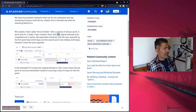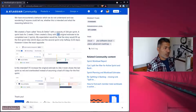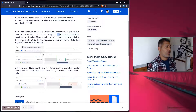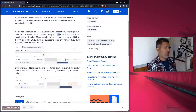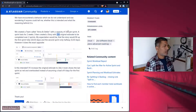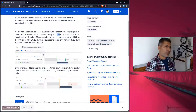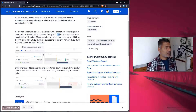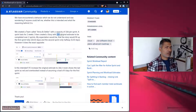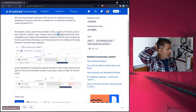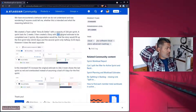So instead of creating one story with a 15-day estimate when you have a team with a capacity of 10 days per sprint, I think it is better to just break it up further, or maybe increase your sprint duration. That is what you can do based on this scenario.